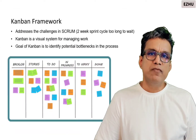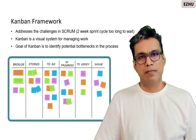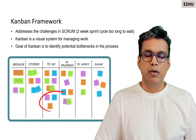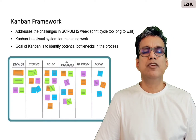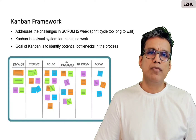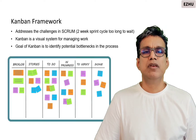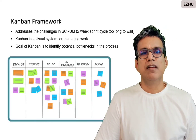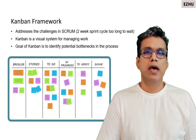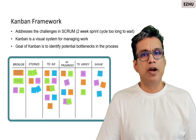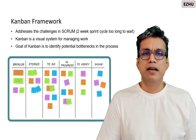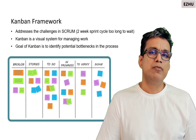The Kanban framework typically addresses the challenges of Scrum. In the Scrum framework, it is two to three weeks for each sprint, and if there are any bottlenecks along the way, there is the need to wait two to three weeks before these issues can be addressed. However, Kanban is a visual management of the work being done by the team and it helps to easily identify bottlenecks in the process and address them immediately. There are certain business scenarios where sprint-level commitments with respect to scope and quality have not been met, and Kanban typically addresses these challenges.